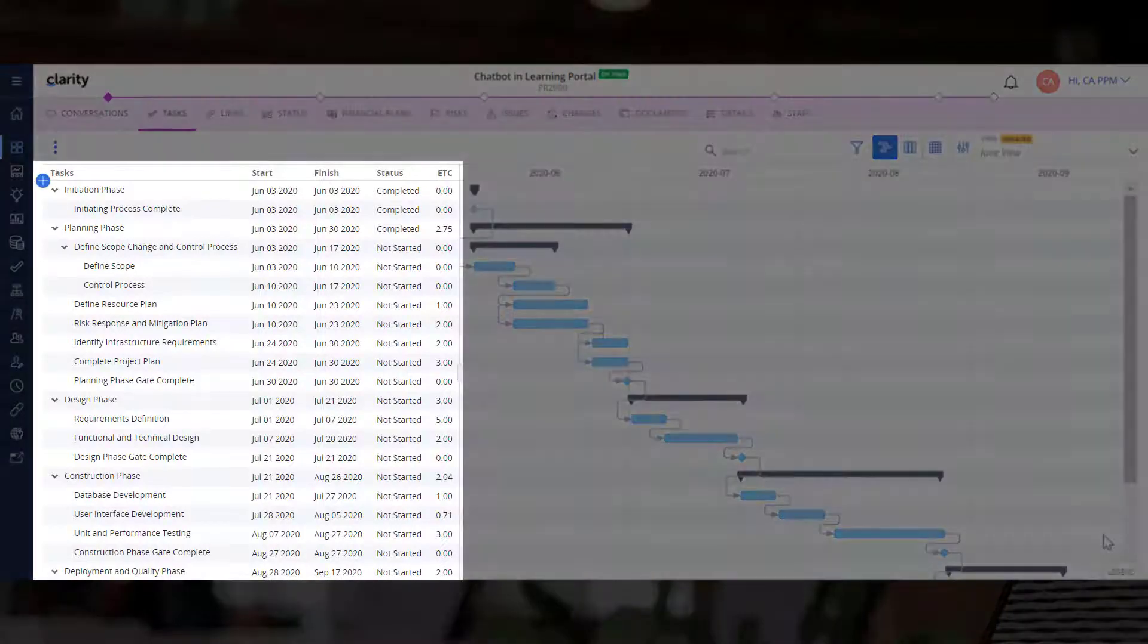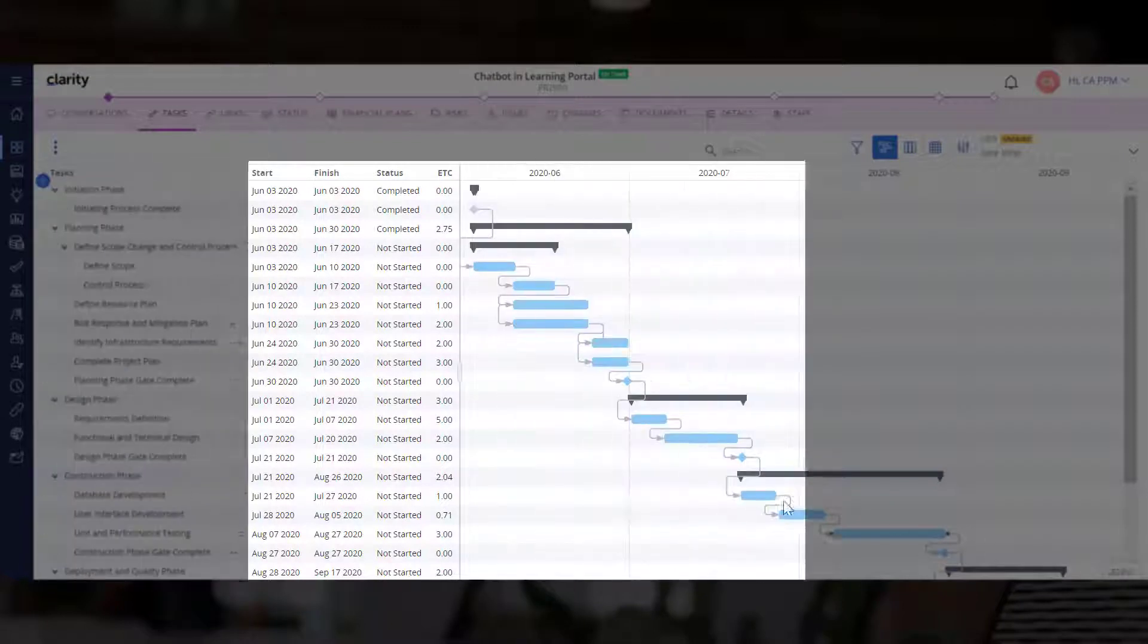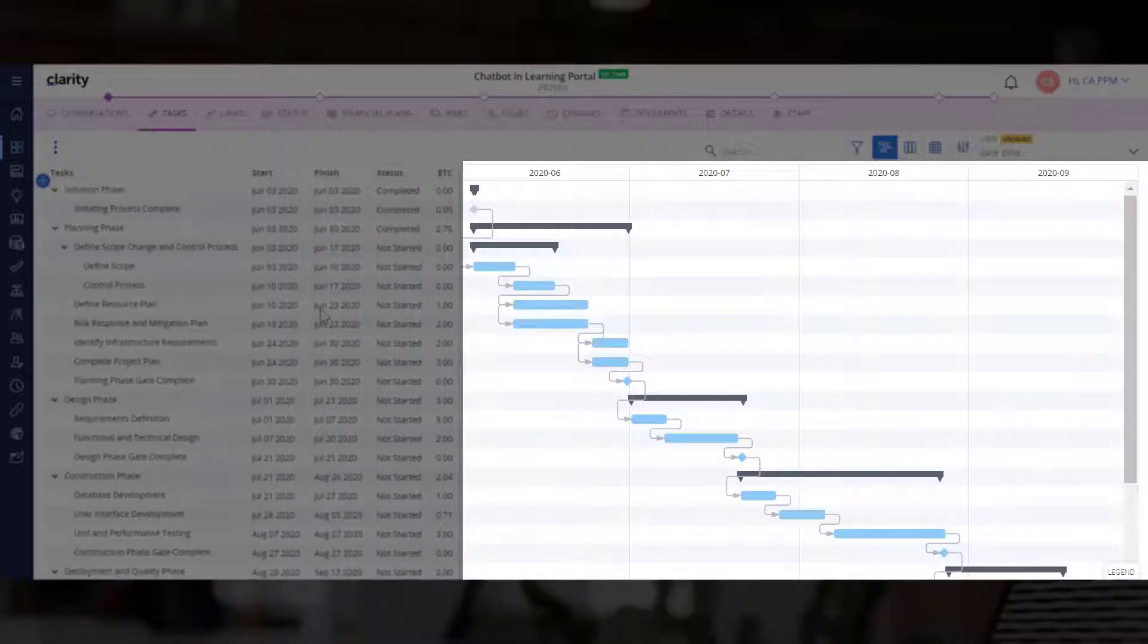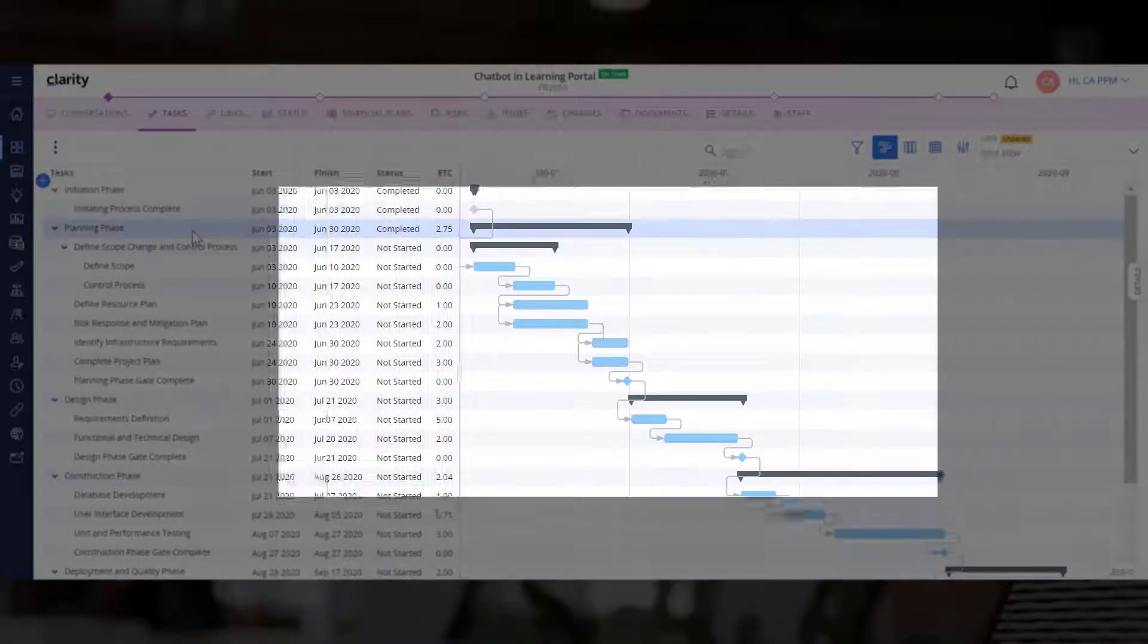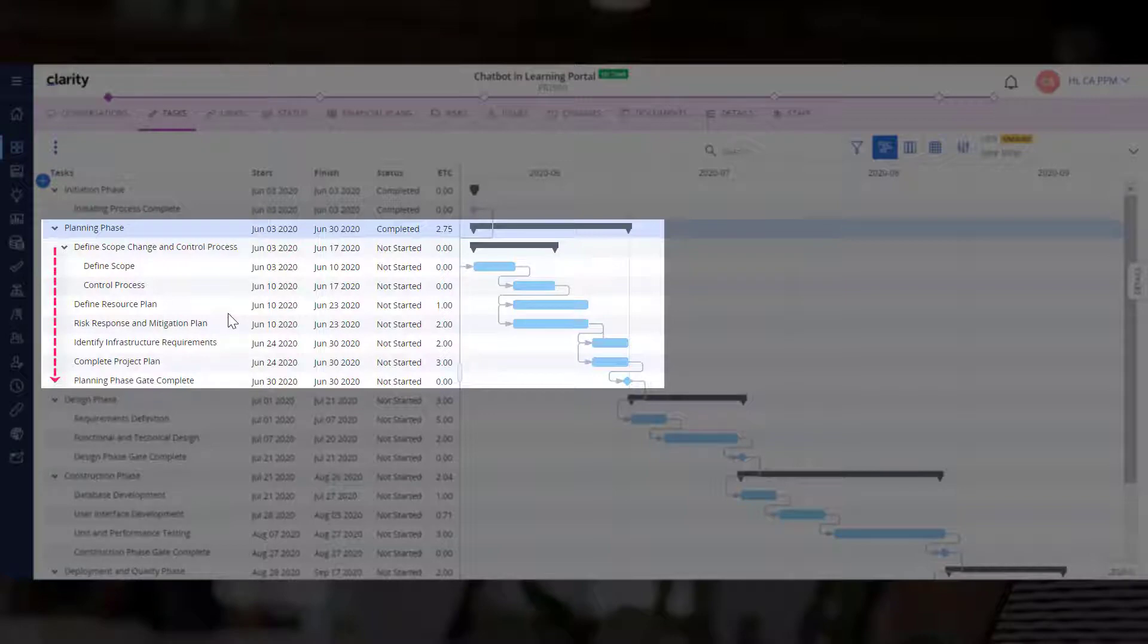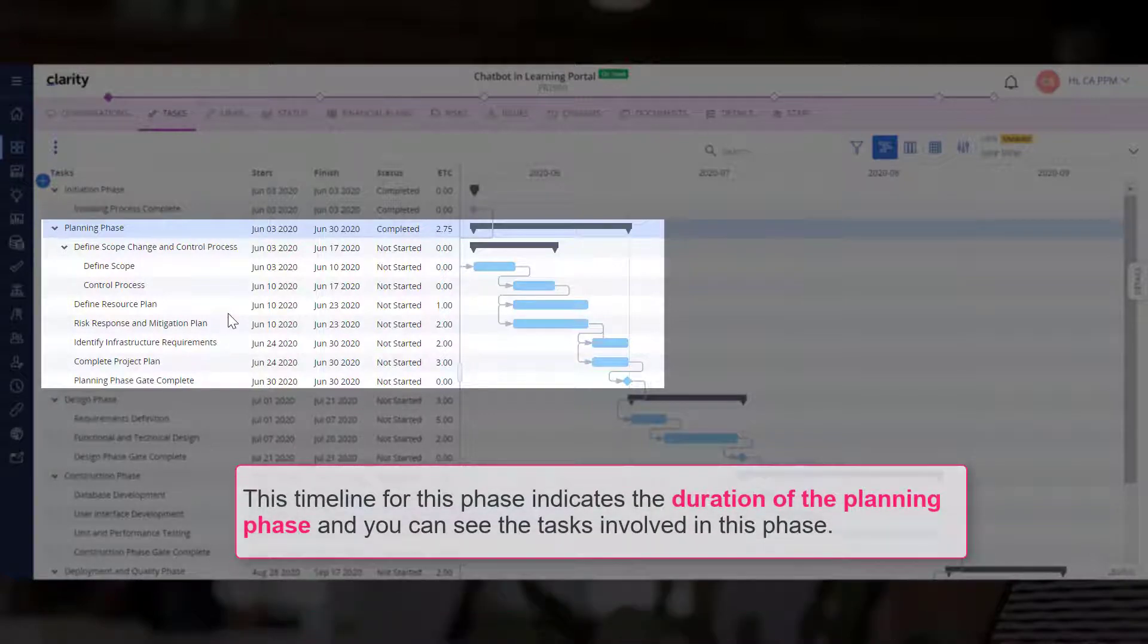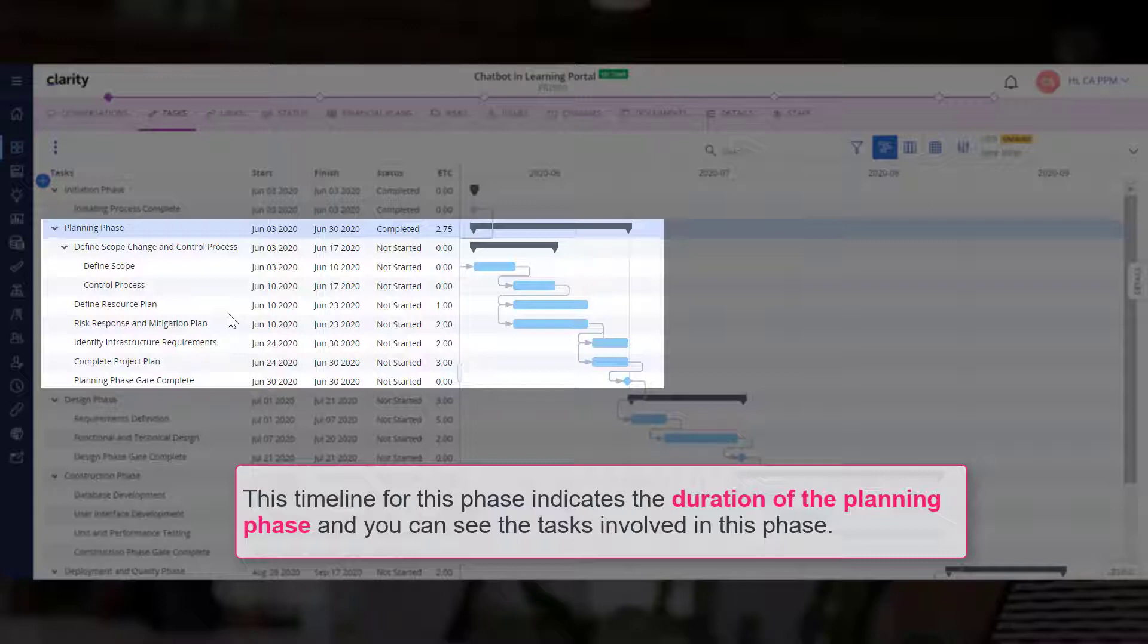Now that we have personalized the timeline, let's explore it in detail. The layout is divided into a Work Breakdown Structure, or WBS, and a Task Timeline. Let's focus on the Planning Phase, which represents the topmost level in the hierarchy for all the items below it. This timeline for this phase indicates the duration of the Planning Phase, and you can see the tasks involved in this phase.